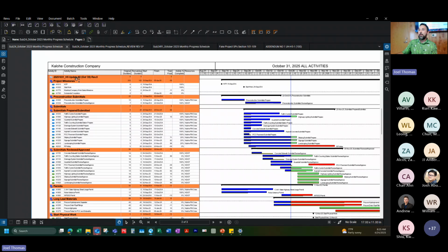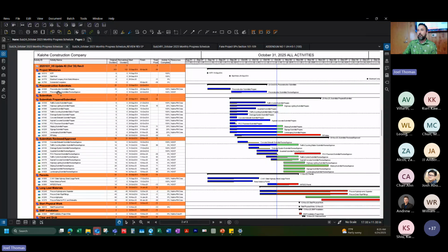And then when you see these highlighted headers, it means that it's what's called a work breakdown structure. It's how the contractor has organized their schedule, and they're basically breaking it into more workable chunks to get through. So I prefer having these filters. If you don't see this on your schedule, you just see a ton of activities, I would ask that the contractor include a printout that does a work breakdown structure like this. It's just a little bit easier to go through.